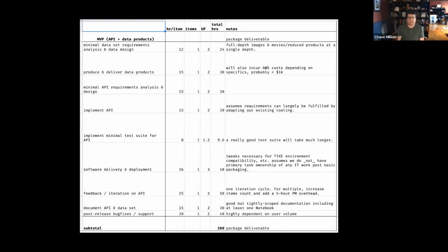Here's an example of this. This is an actual estimation. It's a clip from an estimation document that we produced in my company for a contract. You can see we have descriptions of the tasks. This is from our work breakdown structure. We categorize it under this specific deliverable, and then we have all the tasks therein. Some of those things are communicate with the customers, write documentation, follow on bug releases. And then we produce time estimates for each of those tasks.